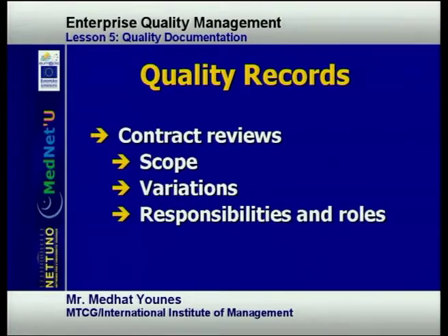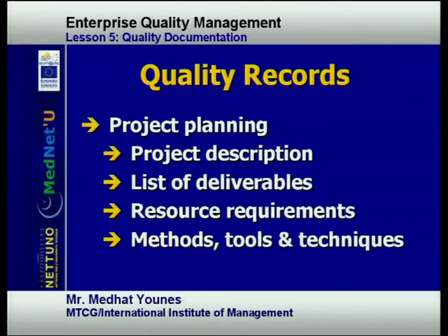If there are any special legal requirement or dispute clauses, it should be reviewed. Implementation support, warranty, and maintenance requirements should be stated if applicable. Also, protection of proprietary information, copyrights, and confidentiality should be taken into consideration. Contracts shall be accepted only if the risk associated with the control and all other specified prerequisites are met.